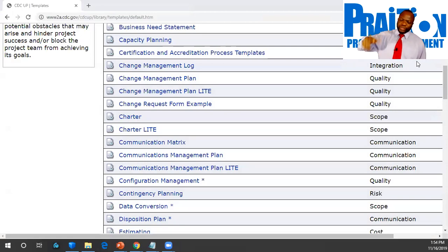Then you need to conceive the idea. The county has hired subcontractor X, contractor Y. They're going to be working on this project. It's a playground. They're going to have all sorts of features that will make people flock there. And here is the charter that authorizes the project. Name of project manager, name of sponsor, high-level deliverable description, stakeholder list, and so on and so forth. A lot of these documents are just to get people on the same page, right?